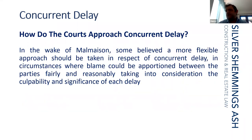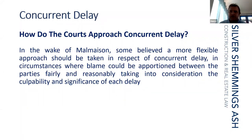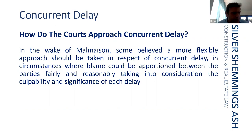In the wake of Malmaison, some believe a more flexible approach should be taken in respect of concurrent delay — one where blame is apportioned between the parties fairly and reasonably, taking into consideration the culpability and significance of each delay. We are looking at the facts, the cause of delay, and the current state of affairs. This always turns on the type of evidence and the ability to prove — it is an argument on the balance of probabilities.